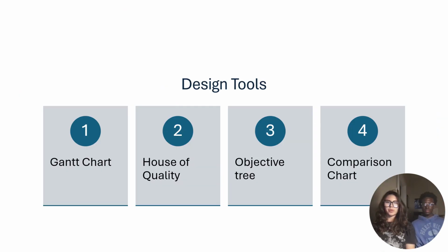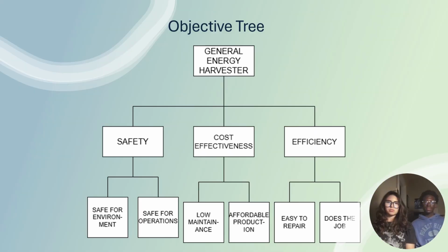Another tool we incorporated was the objective tree. This allowed us to take broad customer goals such as safety, cost effectiveness, and overall efficiency and break them down into more specific, measurable objectives. This helped us stay grounded in what the customer truly valued throughout the design process.